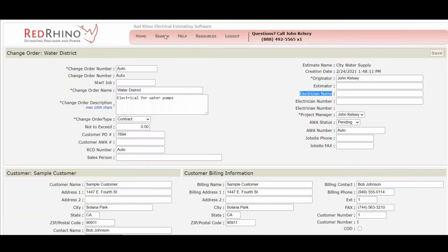Now this seems quite complex, but when you've done it a few times, it's second nature. Let me explain further. I'm going to create a change order, but then I'm going to have to create the estimate and the proposal for the change order. This portion of the video, I might just cover creating the change order, but then I'll want an estimate to attach to it. So let's say that you're on a commercial job or any job for that matter, and you already have a job and you're already working on the job, but then they want you to make changes. You would create what's called change orders for that job, come up with a number to give your customer, and then if they approve it, you would do the work.